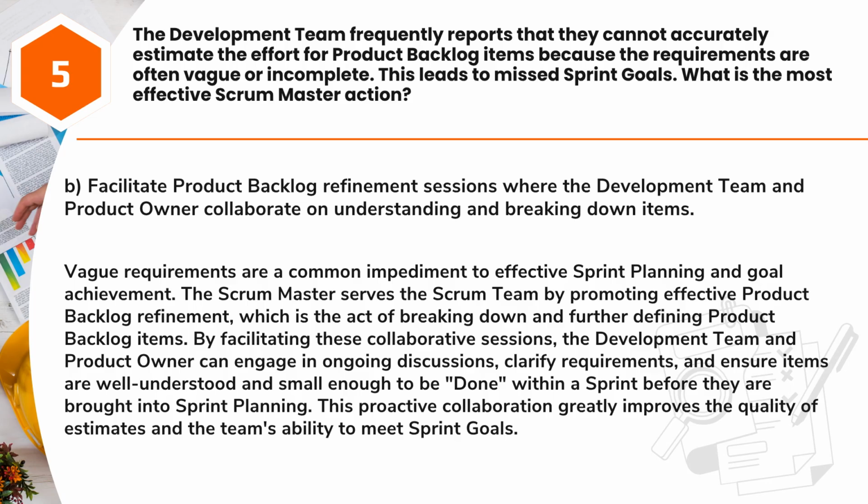By facilitating these collaborative sessions, the development team and product owner can engage in ongoing discussions, clarify requirements, and ensure items are well understood and small enough to be done within a sprint before they are brought into sprint planning. This proactive collaboration greatly improves the quality of estimates and the team's ability to meet sprint goals.